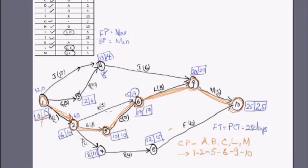One important point to note: despite nodes 2 and 6 both being on the critical path, activity K is not a critical activity. If we add K's duration to the earliest time at its tail node — 6 + 9 = 15 — we do not reach 17, the earliest time at node 6. So it was through B and C, not K, that we obtained those values. Be careful: nodes at both ends can be on the critical path, but the activity between them may still not be critical.